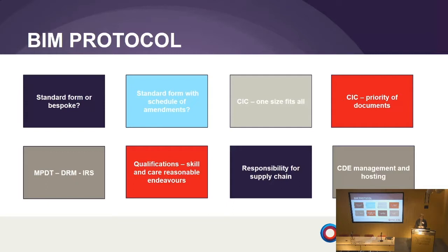And also the CIC protocol qualifies certain aspects. So consultants and contractors would maybe have their obligations watered down slightly through the protocol. So in certain parts it says you'll use reasonable skill and care to do this, you will use reasonable endeavours to do this. If that doesn't match up with what's in the appointment where there might be absolute obligations, which document has priority? And at the moment it would be the CIC BIM protocol.